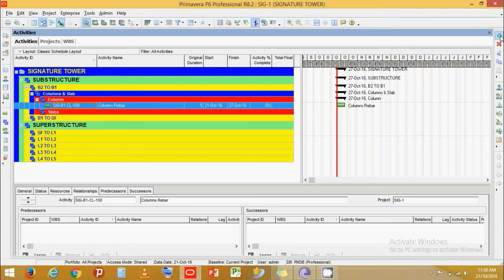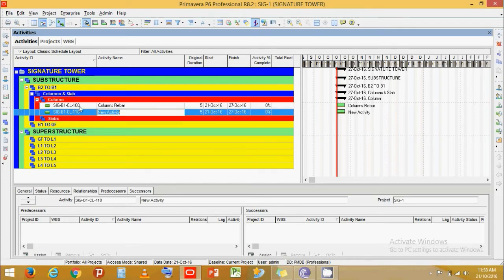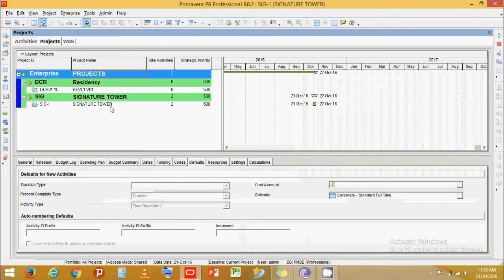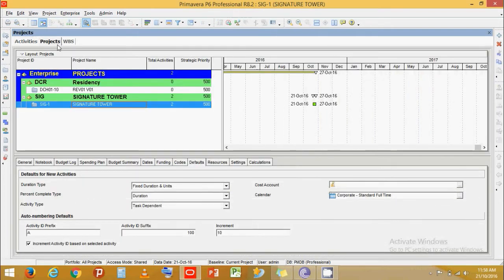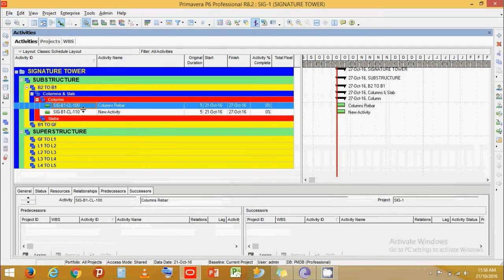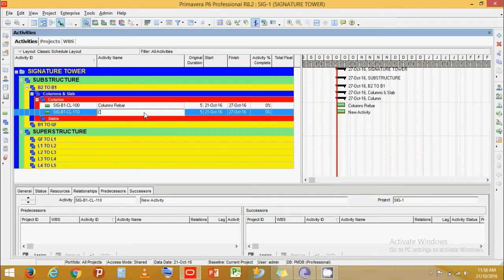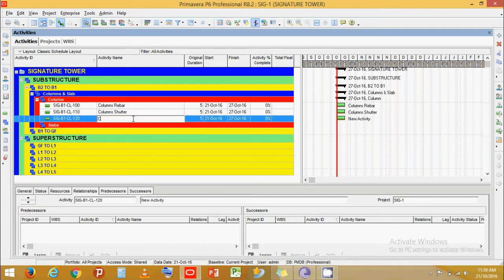Now let's add one more activity. Since we have set an increment of 10, the numbering is automatically set and increments by 10. Let's type Column Shutter. Click Add, then type Column Concrete.